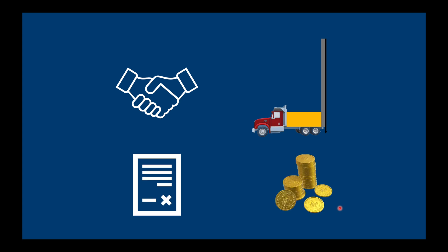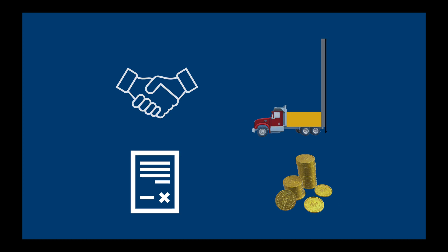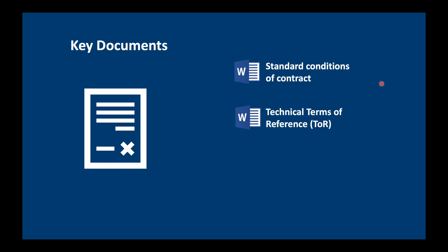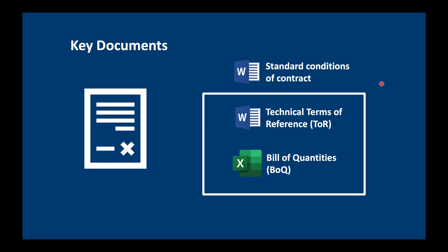All this will be controlled by a bunch of documents. The key documents required are, first of all, the standard conditions of contract — usually one big document written by the lawyers of your institution or company. That's not something we're going to edit. What we hydrologists will be asked to do is develop the technical terms of reference and also the bill of quantities. These are the two documents we're going to talk about today.